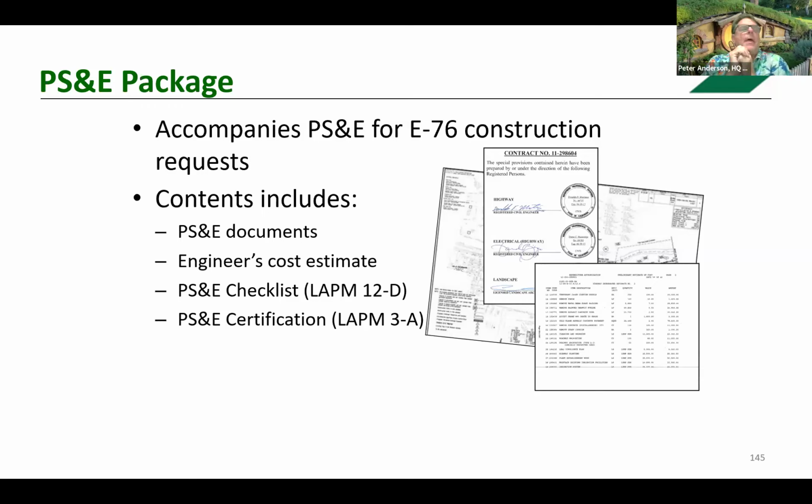That's one of those it depends. Yeah, I think it depends also. And my thought was you can do change orders. I think there's also the case where plans get edited during advertising. At that point, every potential bidder needs to be notified of those changes before the bids can be accepted. But I think for minor stuff, and again, it can't change the cost, it can't change the other stuff that was already part of the authorization.